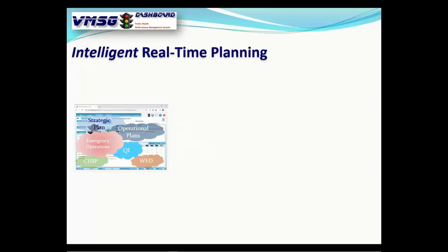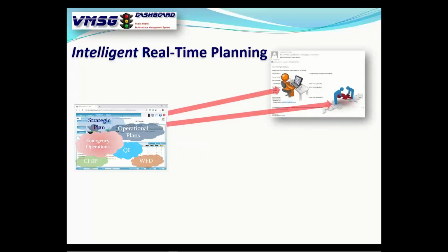At 1 a.m. on the first Monday of the month, really at 1 a.m., the system goes in and it looks at every one of your users who's been assigned as an activity or objective lead, and it asks 3 questions. Number 1, have you been in the last 30 days and updated your stuff? Number 2, do you have anything that's behind schedule? Number 3, do you have anything that's overdue? If any of those is matched, out go the emails.